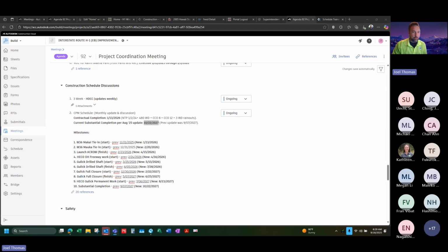Mike, did you have another one, or is your hand still up? Last one. Yeah. Excellent presentation. Very good, Joel. How much time would you recommend spending on time management and risk management on a project like this? I fully agree with you that the only way to do it is to track delays as they occur. I found that I was putting about 8 to 10 hours a month minimum on some of our larger projects, because that's the only way to do it. It's not a minor issue. What are your thoughts on that?